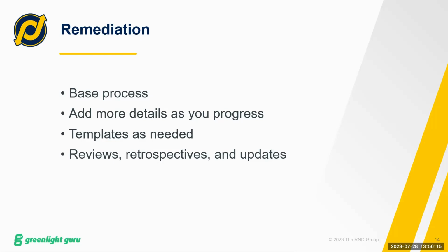So a lot of times what I suggest there is we create the document and they go ahead and fill it in and make it project specific. And then as your organization grows and as you get more projects, then you make a template from that document. You pull the project-specific things out of it, you make it a little bit more generic, so it can be applied to all of your other projects.